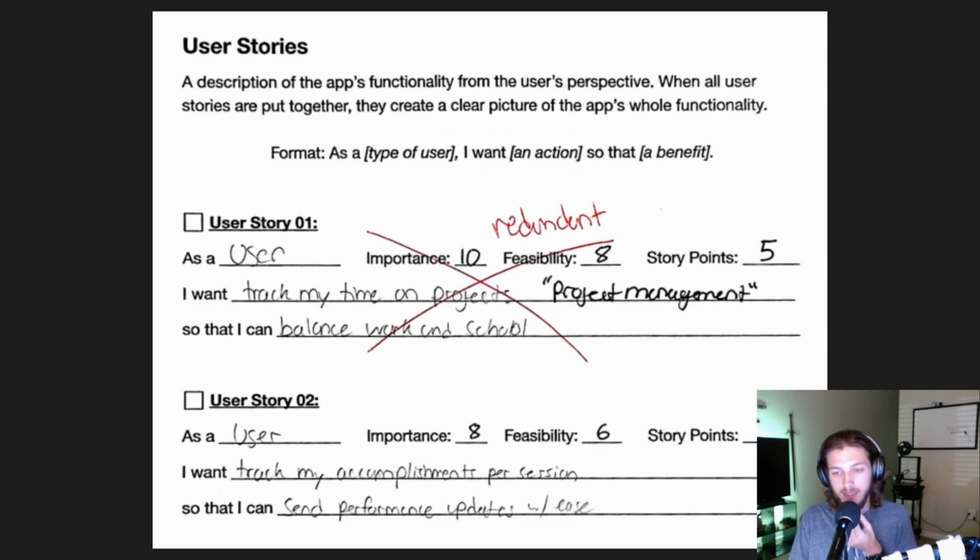Story points 3. If you're interested in what story points are and how they work, there's an Agile approach, it's basically based off the Fibonacci sequence of story point numbers. The idea is you have 1, 2, 3, 5, 8, 13, 21, and you bucket all of the stories and all the things into those categories. 2 is twice as difficult as 1. 3 is 3 times as difficult as 1. 5 is 5 times as difficult. So you can easily compare amongst the two.